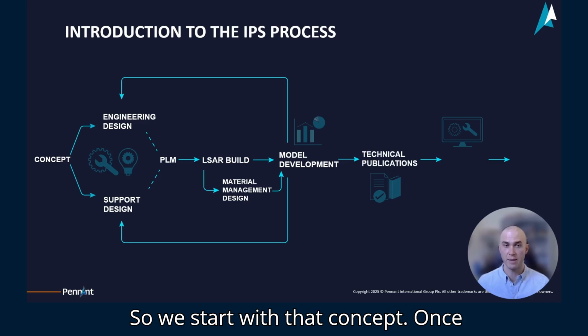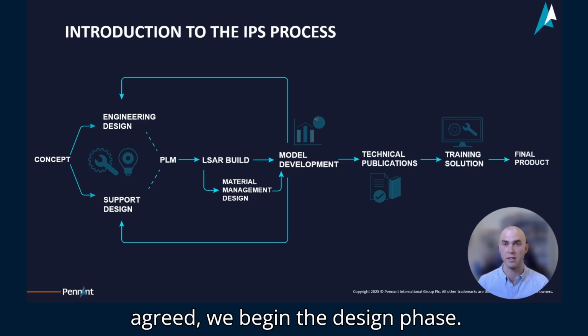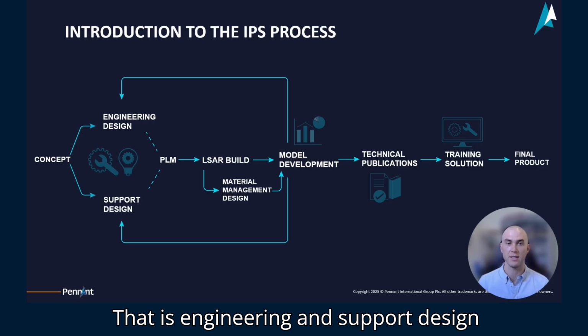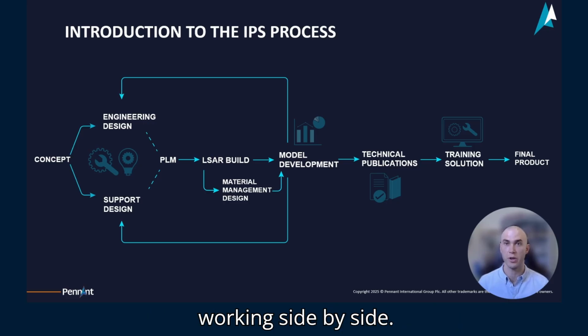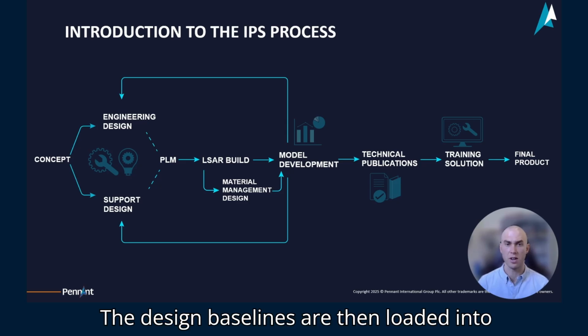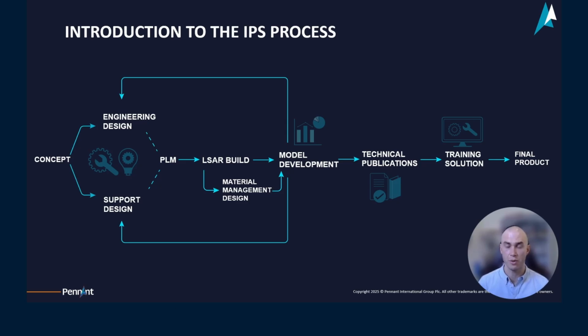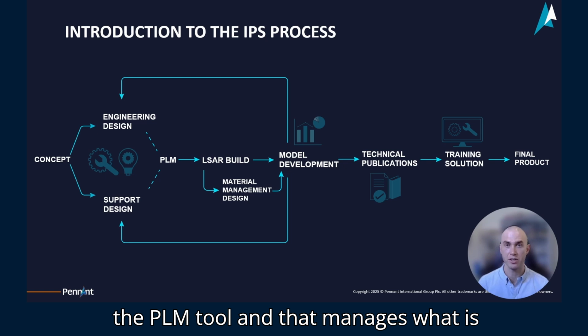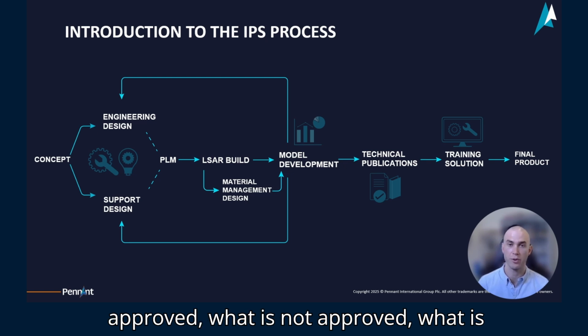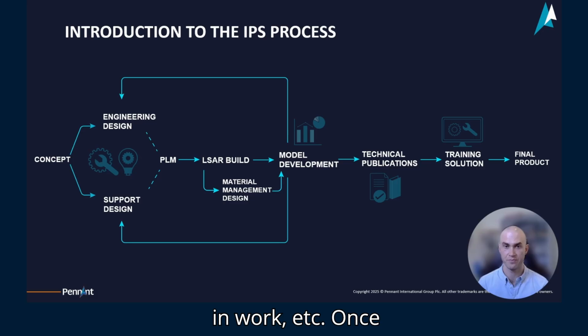So we start with our concept. Once agreed, we begin the design phase. That is engineering and support design working side by side. The design baselines are then loaded into the PLM tool, and that manages what is approved, what is not approved, what is in work, etc.